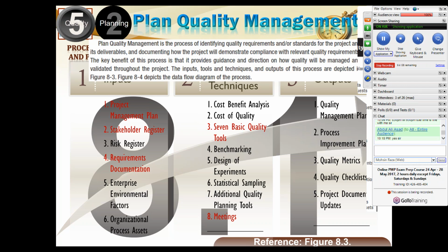Each quality feature which you are supposed to include, you have to carry out the cost benefit analysis of that. And in the chapter of cost management, we studied what is cost benefit analysis. We said we do the payback period, net present value and all that. So you will make that decision here whether it is feasible to introduce this quality or we should not do it.